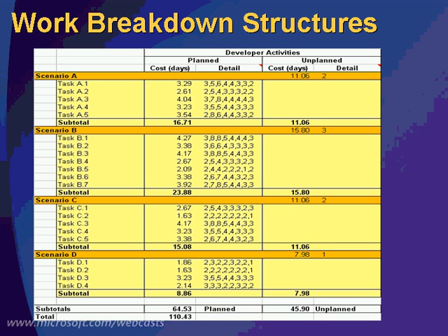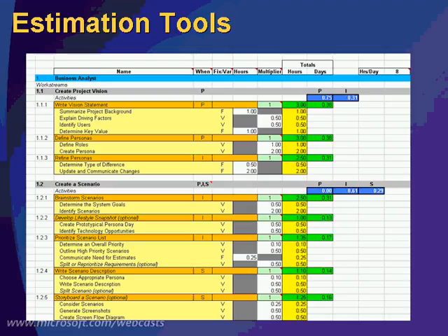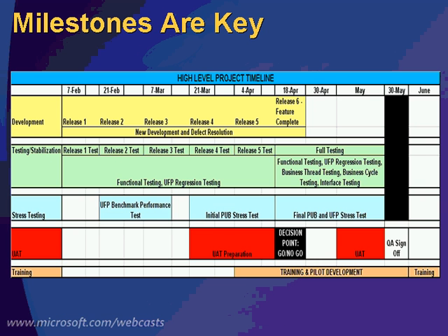Here's just a quick look at how you might structure a worksheet to go through and create these breakdowns. Basically you just try to define the tasks as low as possible and come up with reasonable estimates. Here's another view with a spreadsheet in terms of how you might come up with these estimates based on different factors: is it a fixed number of hours to do something, what's the complexity, and how many hours it might take to do something.